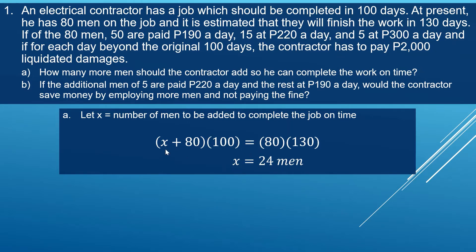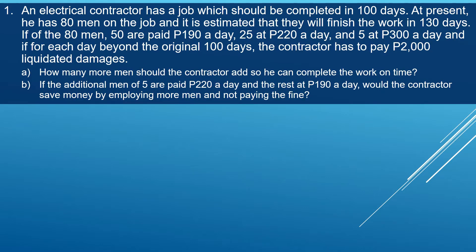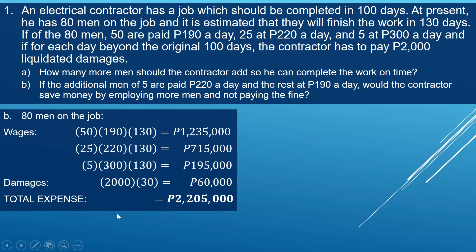For letter B, we compute the total expenses by comparing two scenarios: 80 men on the job working 130 days versus 104 men (80 plus 24) working within 100 days. First, we compute all the expenses for 80 men on the job within 130 days.